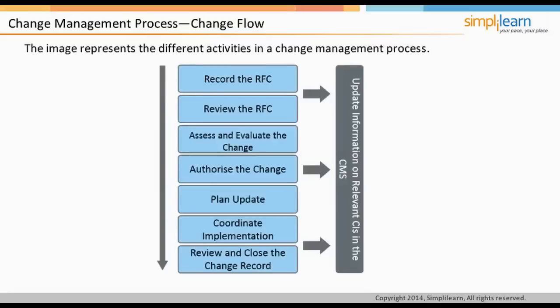The change management process starts with a request for change (RFC), which is logged in the change management system. Information is captured and tracked through to completion. An initial review is performed to filter RFCs that are incomplete or incorrectly routed. The RFCs are then assessed, which may require involvement of the Change Advisory Board or Emergency Change Advisory Board for business justification, impact, cost, benefit, and risk assessment. This is authorized by the change manager. The change requester will then ensure they have approval across three main areas.